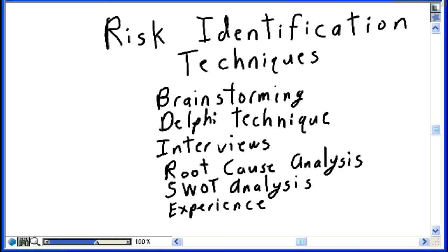While it's wonderful to have a list of risk categories such as technology, human resources, etc., how do you really go about doing a risk identification? Where do you find the risks? How do you find the risks on your project? Suggestions may be brainstorming. Work with your team. Have a whiteboard session where you simply ask, team members, where are the risks? How is this project going to be impacted? Do a blue sky session where any and all possibilities are acceptable, and then go through and do further analysis to determine which are realistic risks, which are probable risks, and which can be dismissed.